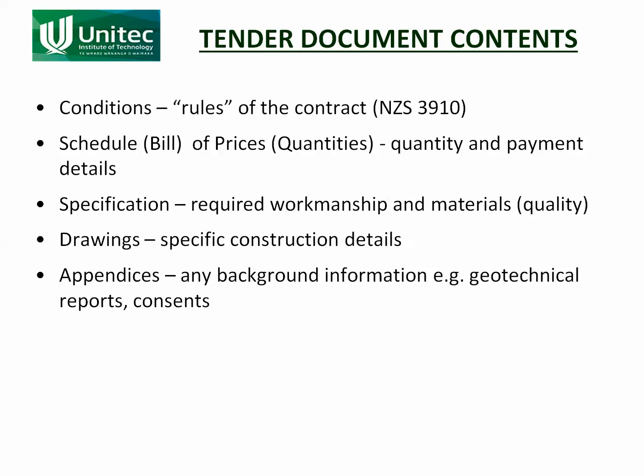Those parts, those little work packages, are arranged according to what type of work they are. So if you're laying a 200mm diameter pipe, all of the work involved in laying 200mm pipe would be one schedule item. A 300mm pipe would be another schedule item, and so on. It makes it very easy for both the engineer and the contractor to price the project, because you break it down into smaller parts, you put rates against each one of those items, add up all the prices, and that gives you the bottom line figure. So you break it down.